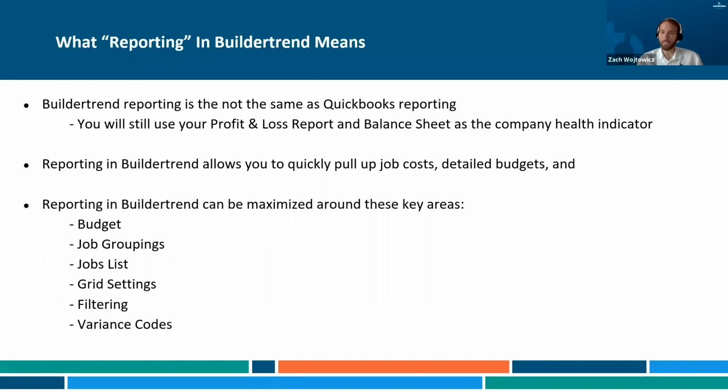That's the misleading thing about that summary table at the bottom of the budget, is it's only really accurate at the end of the job, right? Because it's starting with the total and subtracting your expenses. So it's going to whittle your gross profit down as you go.